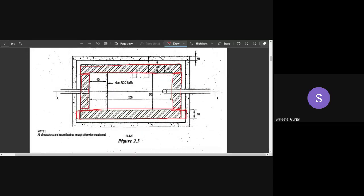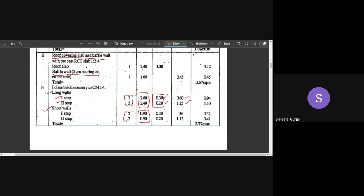For short walls, the length is simply the in-to-in distance of 90 cm with no modification. Total brickwork quantity is 2.77 cubic meters. For long walls, you add wall thicknesses to get the length; for short walls, the in-to-in distance is used directly — same method as for residential buildings.